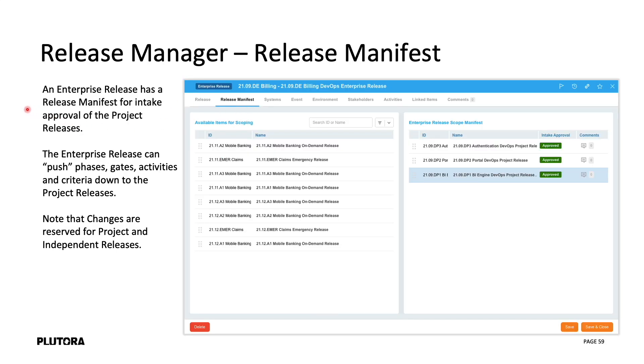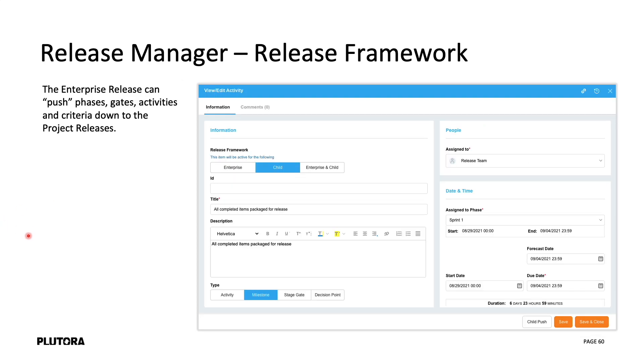An enterprise release has a release manifest for the intake approval of those project releases. The enterprise release can push phases, gates, activities and criteria down to those project releases. Notice that there's no changes tab. Those changes are reserved for project and independent releases.